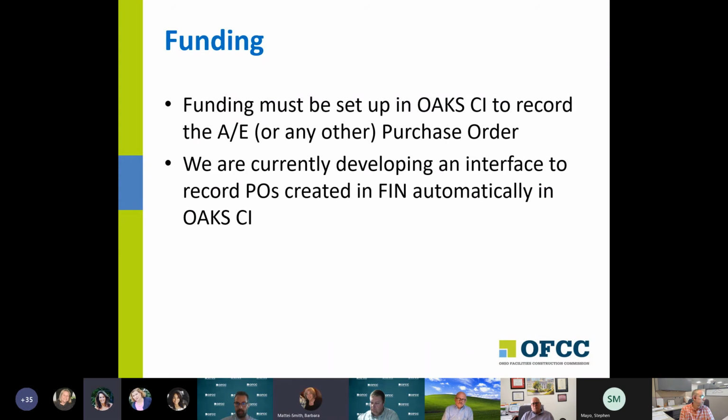And Craig, or I'm sorry, Steve, you're saying that even for K-12, we need to push a budget into OAKS from the budget allocation tool before we can even send out an AE RFQ? Yes. Is that a requirement? Yes. Otherwise, your metrics will not work.